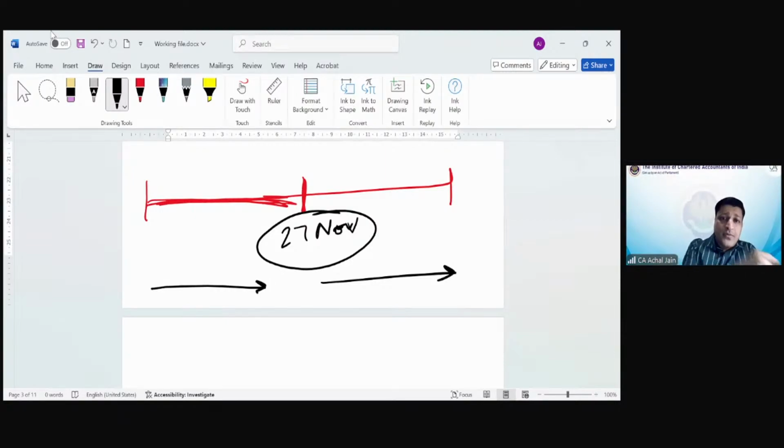So let's suppose a building is getting constructed and you carry out promotions for that building, because you want to sell it. Let's suppose you are the real estate developer. So shall we say that this cost will support the construction? The answer is no. Why? Because that cost will be incurred for its sale. By incurring that cost, the entity will be able to sell that.